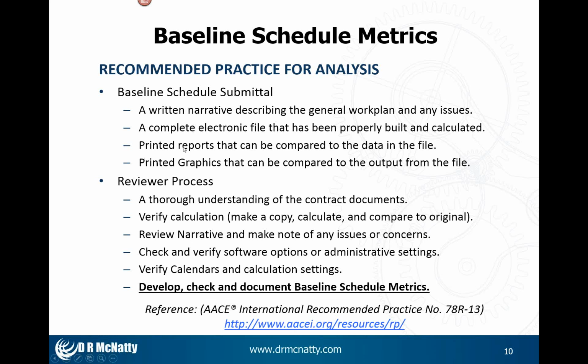And most specifications do cover this. The main reason for this is that I want to make sure that what I'm looking at on my screen, especially after the schedule is calculated, which I deal with down below, matches the same information that is coming out in the printed reports, because if they don't, we have a problem, and that could be the basis for not accepting the schedule.